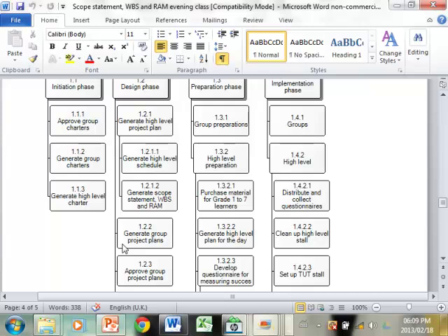Okay, so what you need to do is be creative about identifying milestones where you want certain things that can be tested together, if there are things that are like a black box to you. Yes, exactly, and that's why we break things down into phases, and that's why within the phases we have milestones, so that we can keep a check that everything is still running according to plan. Does that make sense?